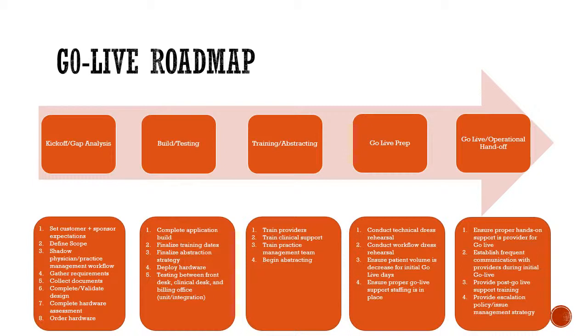And another assumption here is that whoever is implementing or helping you through this implementation has a structured plan of how they will do a certain level of customization or a heavier amount of customization for the practice. So if there are going to be some future workflows that have been identified, you should be aware of what these workflows are and validate that there aren't any gaps in their understanding of what your practice is doing in terms of collecting blood, for instance, in terms of collecting results, in terms of the process of who gets abnormal results or who gets normal results. These are types of questions that happen during this discovery phase of the implementation.